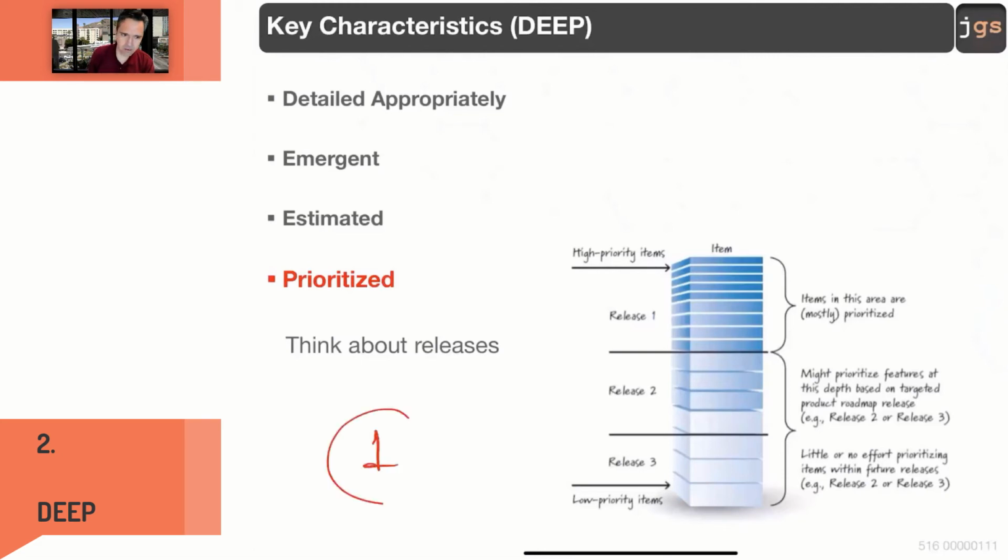Now, priorities are kind of easy to assign. Usually you're going to think about the number 1 as the top priority. This should be done as soon as possible. And from there down, how many levels? As many levels as you need. Usually you're going to keep 1 to 5 or something like that, but it depends on your project and on the size of your product backlog. But 1 is do this immediately, kind of. In the graphical representation, as usual, higher priority on top, lower priority down.